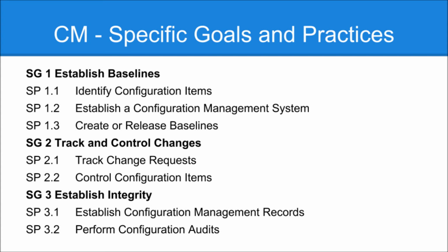The fourth sub-practice in this is to review the change requests to be evaluated or executed in the next baseline. So whenever you have defined your baseline, you must make sure that these change requests are handled in the next baseline or next area that you have defined.